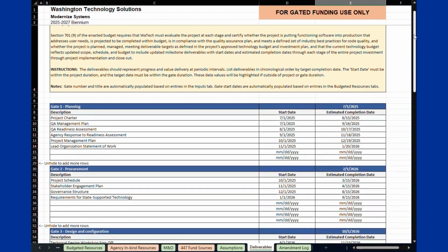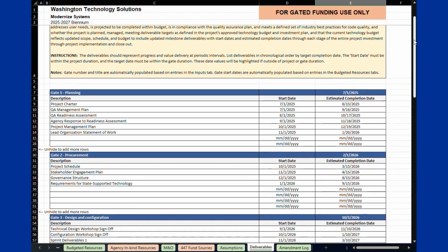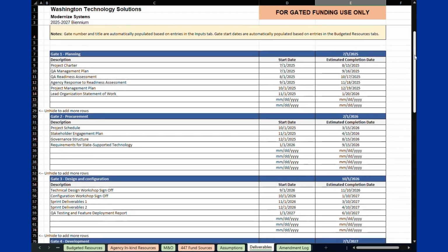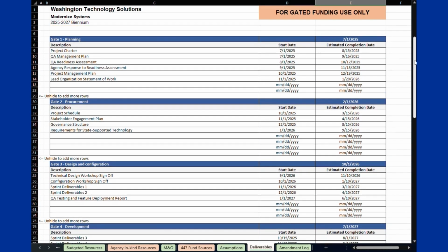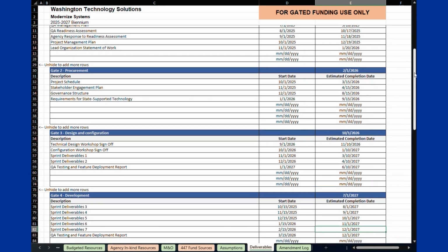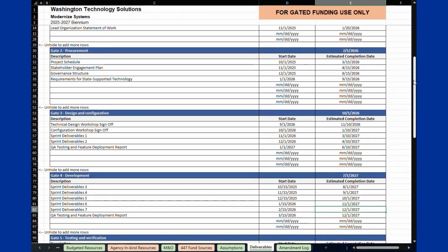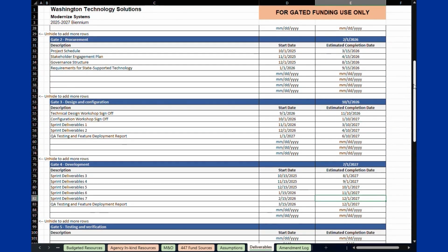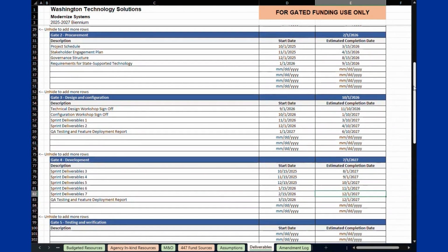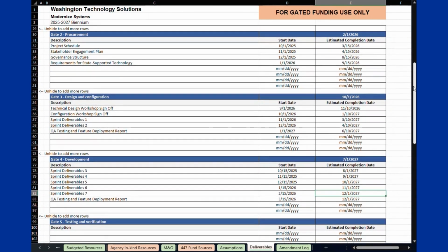With each amendment, you will need to complete this tab by providing the date of the amendment and by filling in the cost estimated from the Inputs tab of the last approved technology budget. This tab will auto-calculate the revised project cost from the Inputs tab in cells D13 through F14, and the net change in row 15. You will need to provide a free-form text response to the 5 questions. What changed? Why was there a change? How does this impact the scope, the schedule, and the budget of the project?